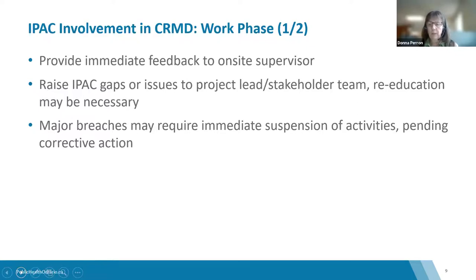During this critical period of the project, it is important not to be complacent. Contractor plans can change depending on what they encounter, making ongoing engagement critical. This may include providing immediate feedback to on-site supervisors, raising IPAC gaps and issues to project leads or stakeholder teams. On-site re-education may be necessary, and major breaches may require immediate suspension of activities pending corrective action.